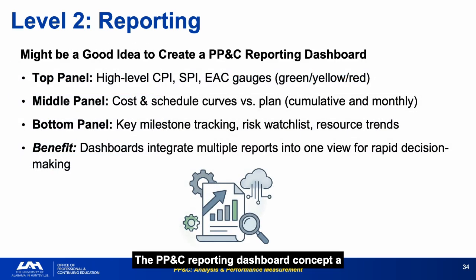The PPNC reporting dashboard concept, a single integrated view with CPI/SPI gauges at the top, cost and schedule curves in the middle, and milestones, risk watch list, and resource trends at the bottom. Dashboards are powerful because they force integration. A green CPI and a red schedule gauge in the same view immediately raises a question that neither metric raises alone.